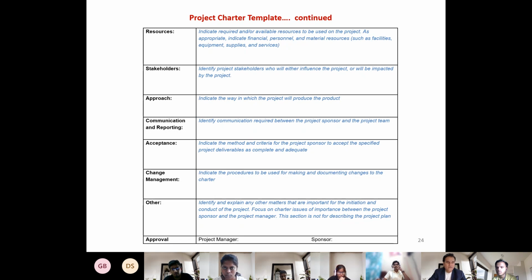So you will write here, I will need 1 project manager, one expert in agriculture side, 1 expert in construction side, maybe a team of 3. And for this team of 3, the average salary could be whatever. And then based on that, in 4 months, you will be able to match that within the 2 lakh, or you will say the 2 lakh excludes the resource cost. The 2 lakh is only the material costs. Okay. Is that clear?